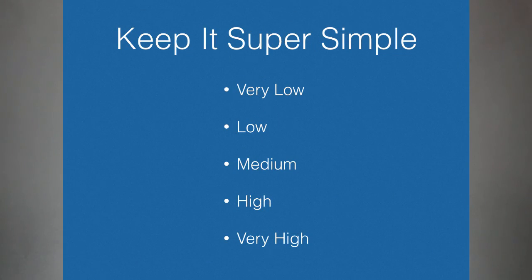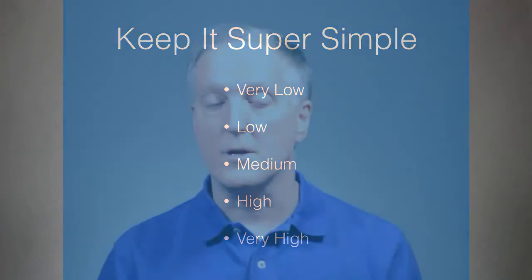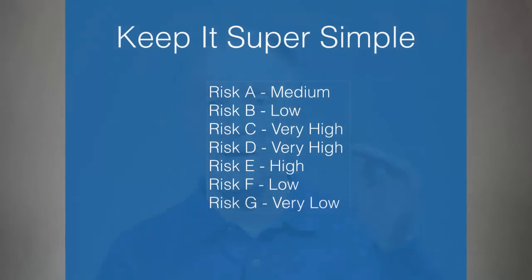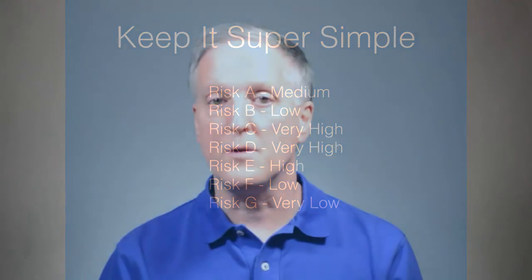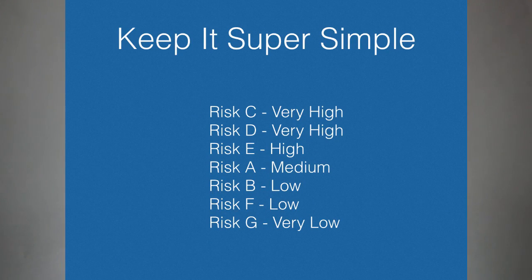So let me share with you two ways to do this — one that's a very simple, quick way, and one that involves a little more time but is fairly simple too. Method number one is what I call the KISS method: Keep It Super Simple. If you've got a small project, there's no need to spend a tremendous amount of time evaluating the risk. You might use a scale like this: very low, low, medium, high, and very high. For each risk, we would go through — risk A might be rated medium, risk B might be low — and then we would sort those risks by their qualitative risk ratings. Very quick, but it gives us a sense of which risks are most important.